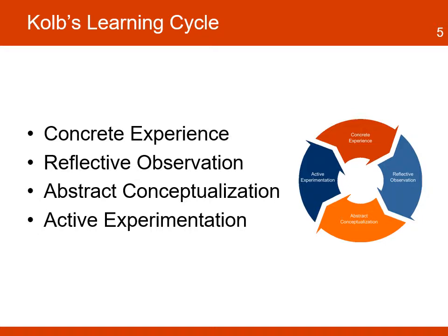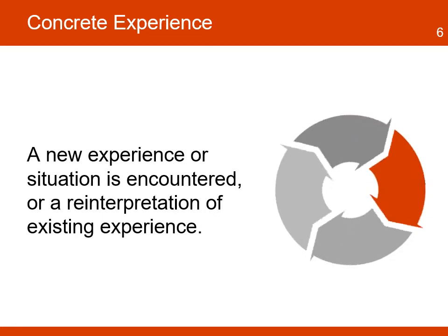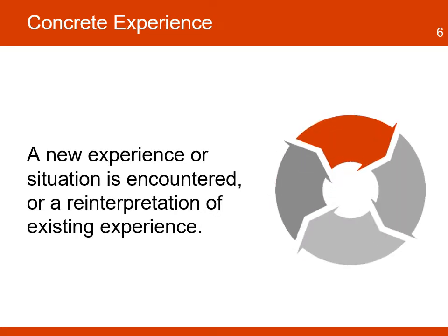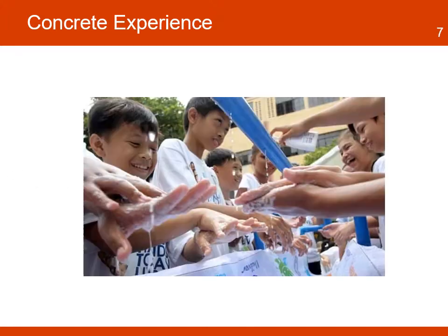This model can be applied to a development project where the team and key stakeholders can participate in the learning process. The first stage, concrete experience, is where the learner actively experiences an activity. The team has many opportunities for concrete experiences during the life of the project: the completion of an activity, the delivery of an output, or the achievement of a major milestone. All are opportunities for learning.